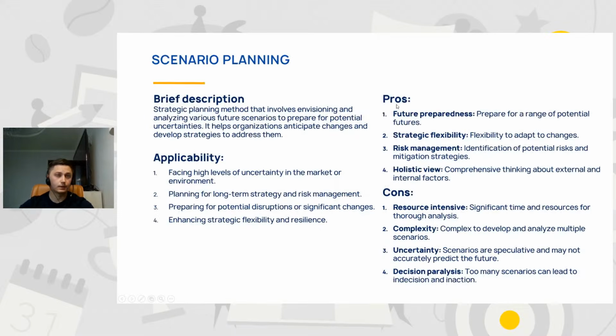The next approach or technique which you can use is scenario planning. This is more of a strategic planning method. In this case, you try to envision what will happen in the future, what problems may arise, how you can respond to these problems. Based on this, you create a scenario plan with different types of responses to this or that problem. And when some problem comes to your radar, you can just use this scenario plan to address it.